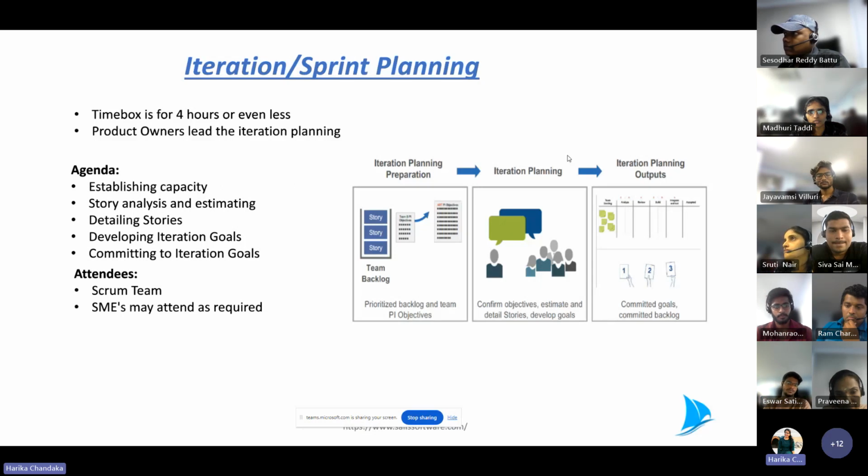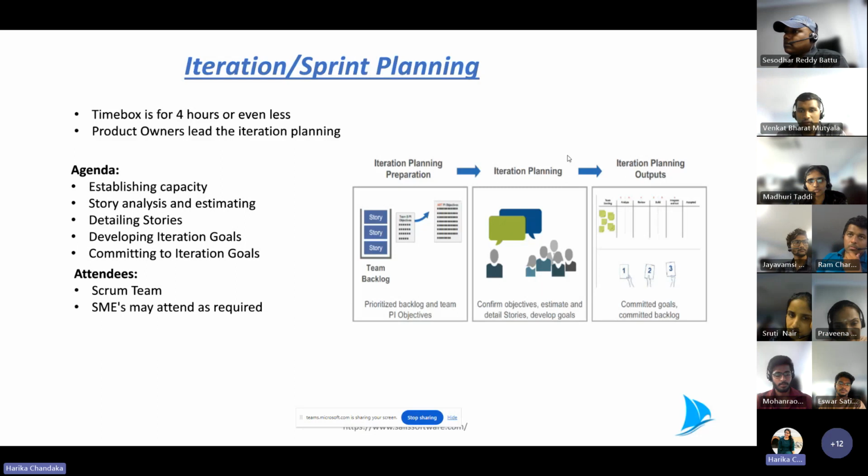In case of any holidays or time offs from any individuals, we should cut at least 1 story point from each of the team, and the maximum story points we can evaluate for a sprint is 35, not 40. That is how we need to balance capacity management as a product owner.